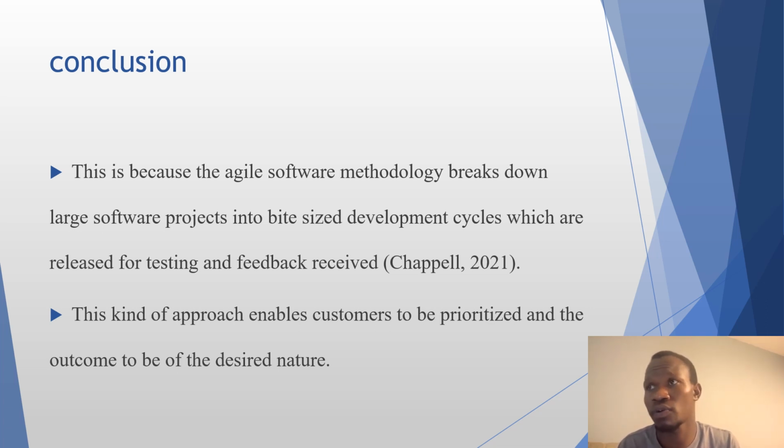And the cost might be more because sometimes if you go over a step and you go to the next one, if the client was to say there's an error in whatever you've been developing for maybe 6 months or a year, then it will be very costly to go back to the former steps, as compared to Agile, which uses iterative steps where you get feedback, you test the small bits that you have done, and it's more secure to do it this way because you can always change whatever you need during the process rather than wait to go down through all the steps and finally get stuck when you find that the client didn't want the software or you need to make some changes due to some errors or some changes that have been requested by the client.